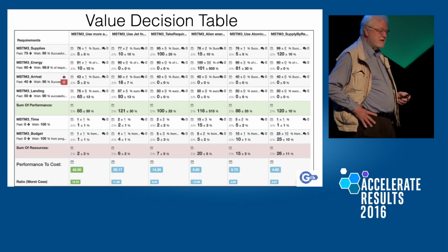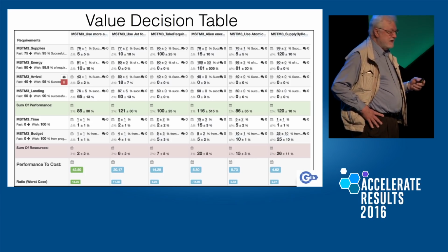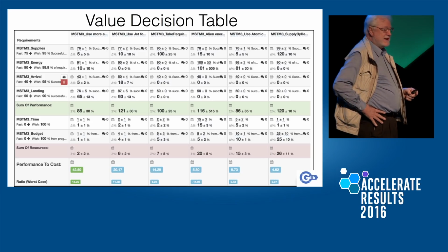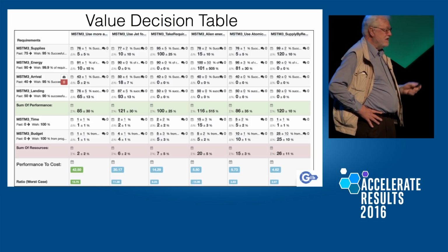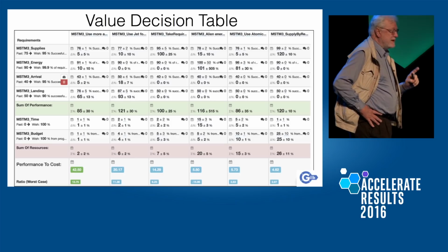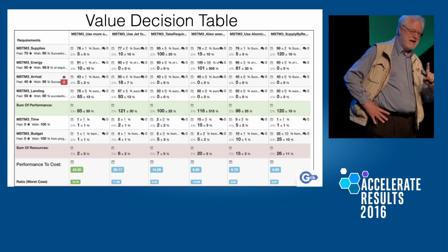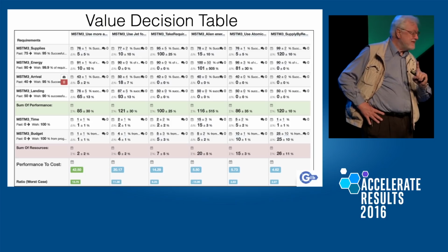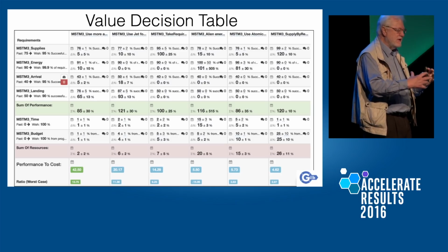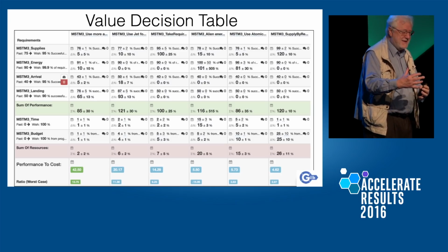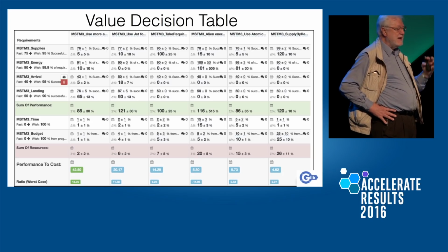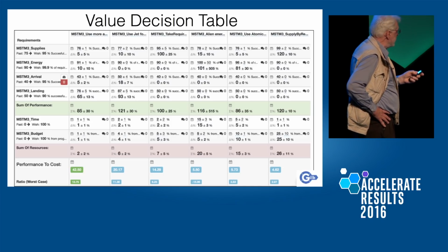Okay? But this is a traditional engineering idea of systematic side effect analysis before you commit money and time to an architecture and screw everything up and say, I wish we'd planned this better. You accelerate by, this is something we do sometimes, we draft a table like this in 1 day. So we're not using 6 months to think about this before we leap. We're often using 1 day to get a draft saying, looks reasonable, so let's move on.